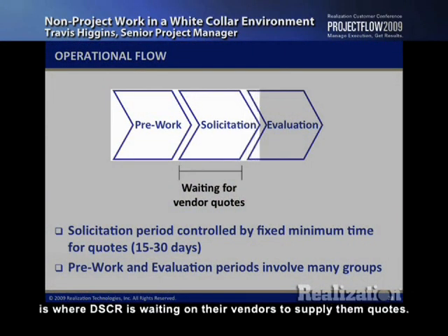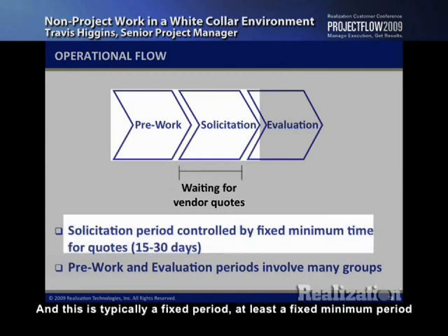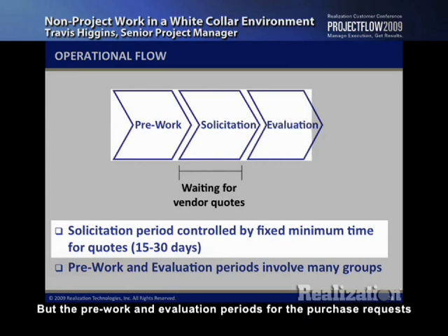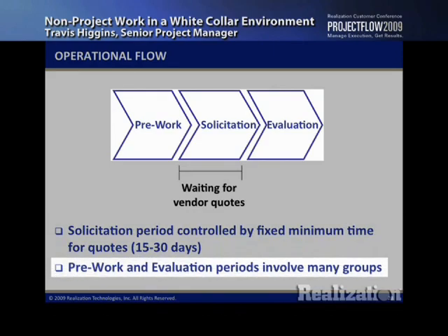In solicitation, this is where DSCR is waiting on the vendors to supply them quotes. And this is typically a fixed period, at least a fixed minimum period of 15 to 30 days that DSCR is waiting to hear back on a quote. But the pre-work and evaluation periods for the purchase requests are done completely in-house, and they involve many groups.